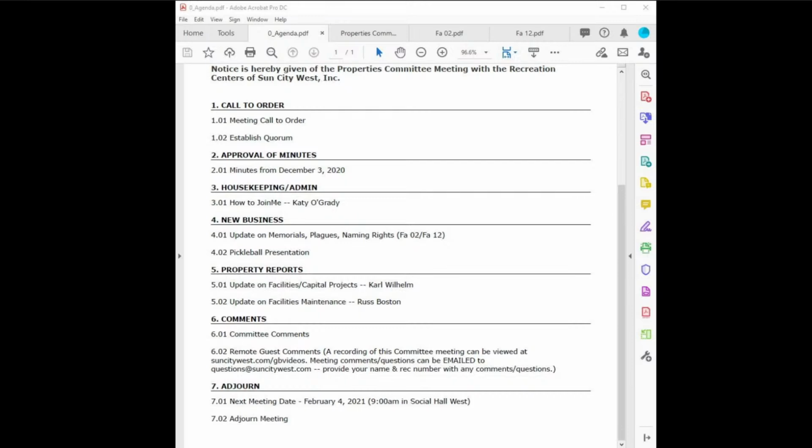If any approvals for any stage of this project, first design from the current budget that we're asking, we're providing a placeholder for design costs only. It wouldn't be until another whole year later before the discussion of actually approval of any project costs goes into a budget. So this is all about planning right now, and your comments as committees.